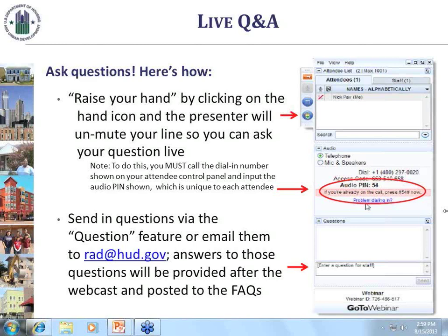So if you're asking for release of the first part of the site, and that first part of the site has 40 units, and you can build commercial on that first part of the site, as long as you give us back 40 units, we don't care what you do with the commercial. And then we release the second part of the site when you show us financing that matches.